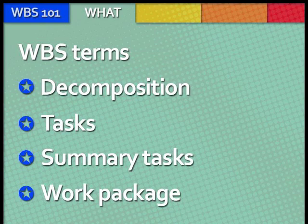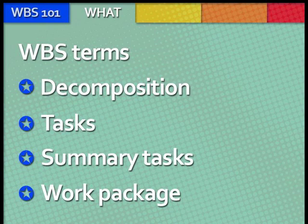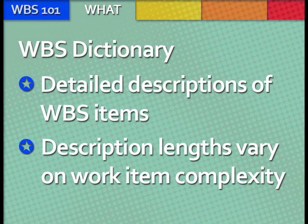The final level of a WBS is the Work Package. The Work Package is the only level which can be given time estimates since they are individual elements of the project. A WBS dictionary is a document that describes detailed information about each WBS item. These Work Package descriptions can either be a short paragraph or a page or more, depending on the complexity of the item.